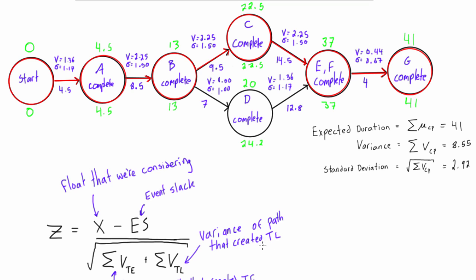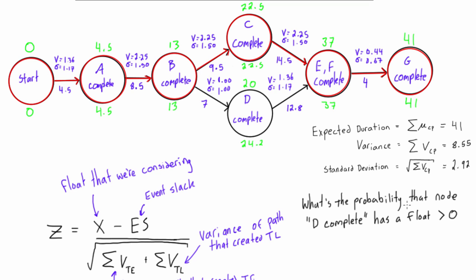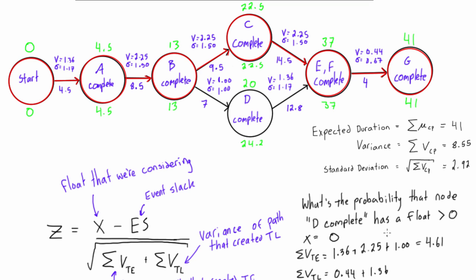Now let's do an example. What is the probability that node D complete has a float greater than 0? We need to fill out all the variables in the equation. X is the float we're considering, so X equals 0. The sum of variances along the TE path is 1.36 plus 2.25 plus 1.0, which gives 4.61. The sum of variances along the late time path is 0.44 plus 1.36, giving 1.8.